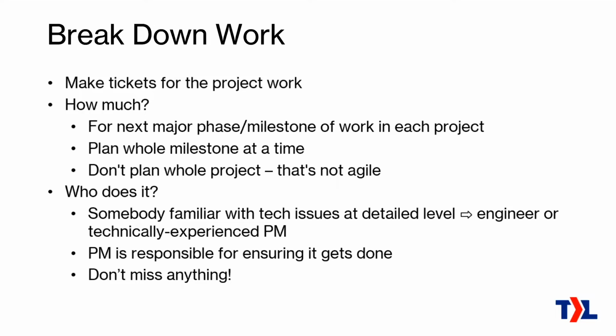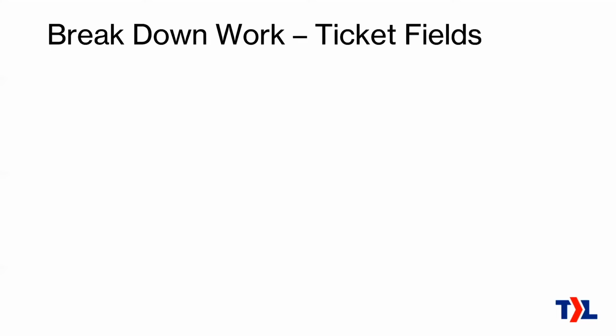One of the reasons for doing it phase by phase, or milestone by milestone, is that if you're in the mindset of thinking about everything that needs to happen for us to deliver this milestone, that makes it easier to make sure that you're thinking about everything and you don't miss anything.